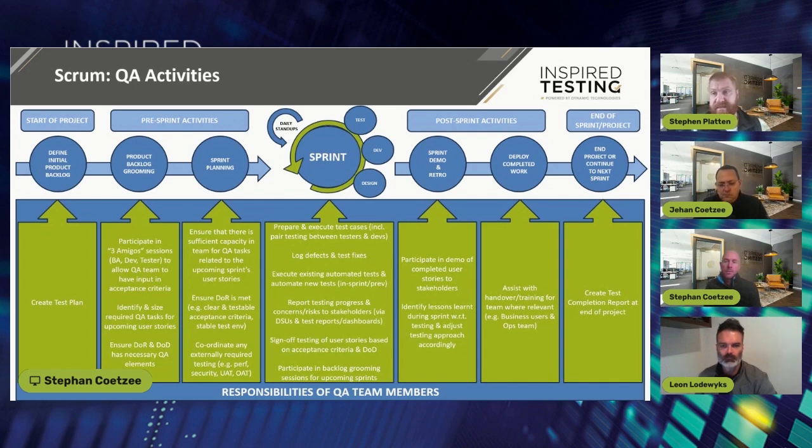That can also help you to factor in that 30%. If the team's pretty consistent in quality, that 30% can come down to 20% potentially. If you're just starting off and the coding standards aren't great, obviously you need to increase that buffer. But it's a conversation with the product owner to make sure that quality is considered, and that maybe a defect threshold is one of your sprint goals. You say we don't want more than, I don't know, 10% of open defects in every sprint release or something like that, and you can come up with that as one of your sprint goals.